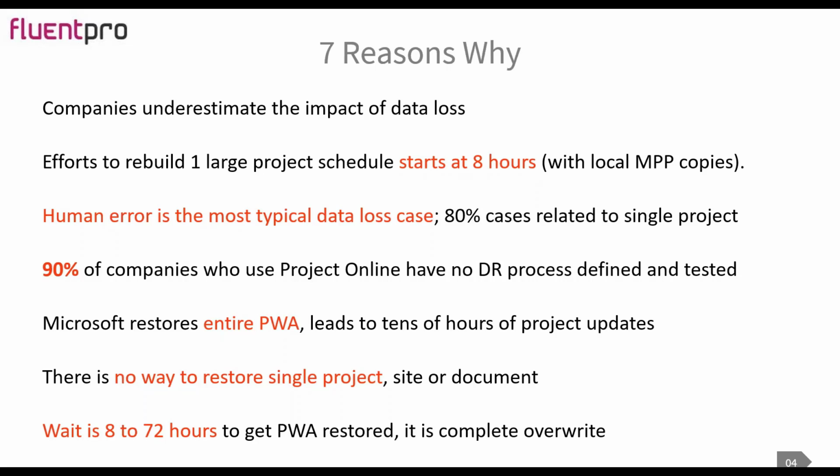Microsoft provides restore features, but it provides that feature at the site collection level. It means that the site collection is your entire PWA. And if you have 1,000 projects, or 100 projects, Microsoft can restore the state of your entire PWA to a date in the past, for example a couple of days back.